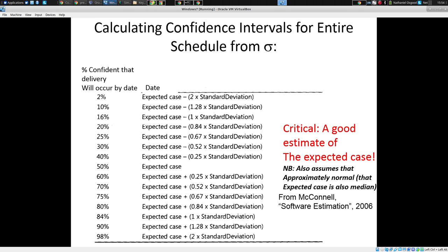And finally, and something that might be covered in a coming lecture, there's elements of scheduling. And it's to this that Will alluded. We have dependencies. We have this depends on that, it depends on that. If Joe is late with their component, Mary's going to be delayed, and Sue is going to be delayed further from that, and it's going to ripple through when we need to grapple with those components.